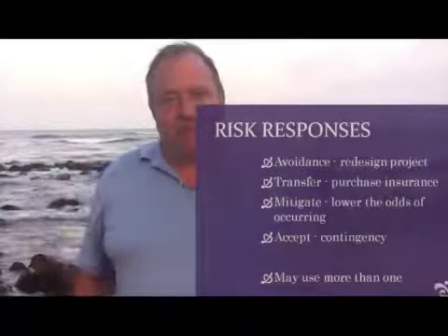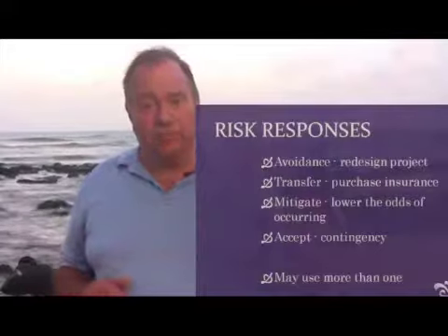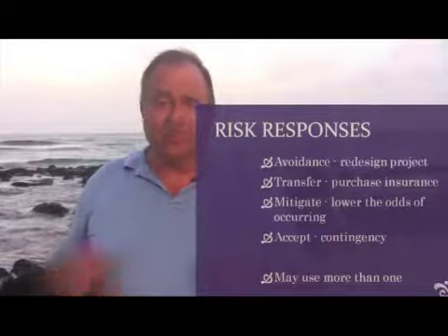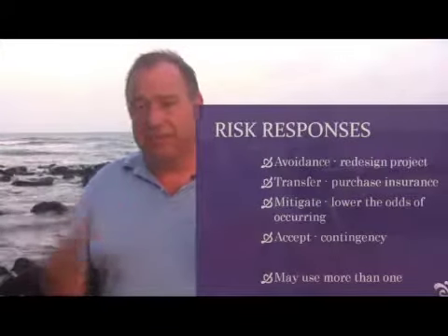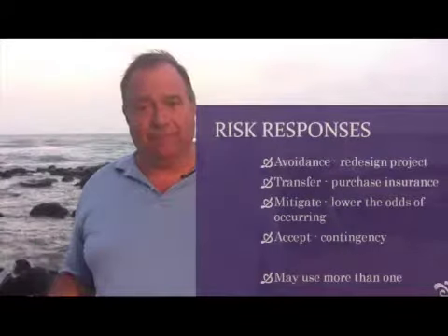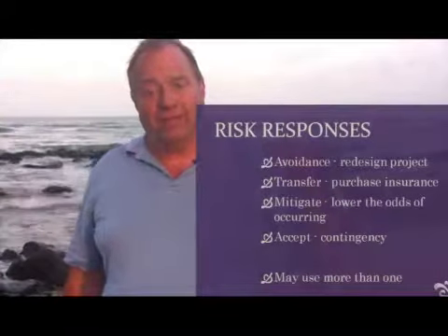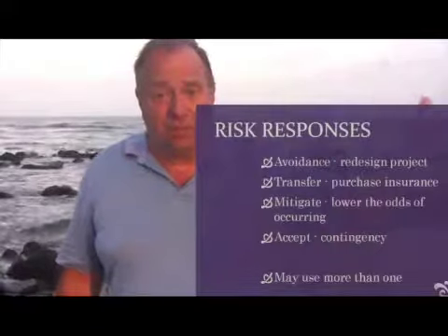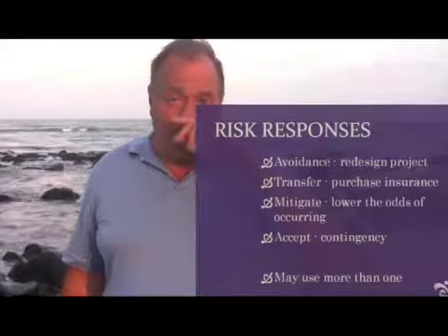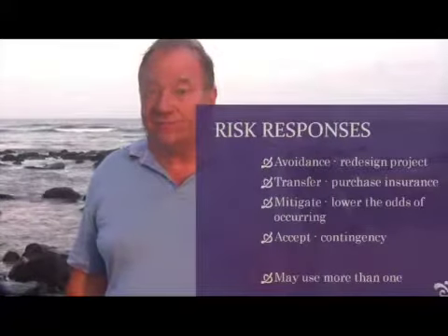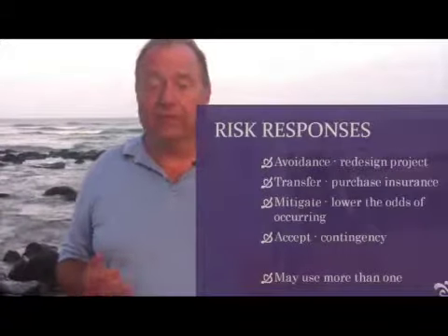Okay, our last couple of risk responses are risk mitigation, where we do things to lower the probability of the risk or lower the magnitude if it does occur. And that's mitigation. So we might do things, as an example, if we're concerned about people quitting mid-project, we might offer them a project completion bonus if they stay through the whole project. So we spend a little bit of money, and reduce the probability of them leaving mid-project. And that would be a mitigation action.